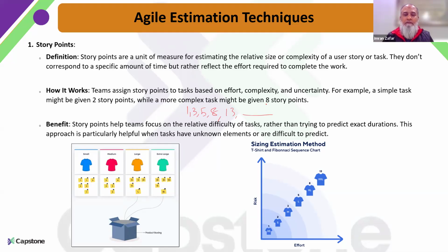Or teams can also utilize the t-shirt sizing technique, where the sizes are small, medium, large, extra large, or maybe an extra small one as well, and you can map them to story points accordingly as you decide as a team.